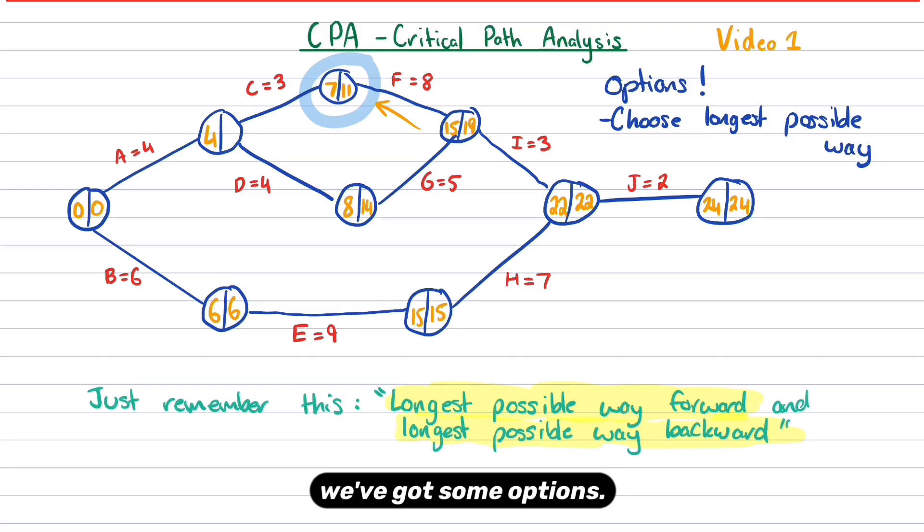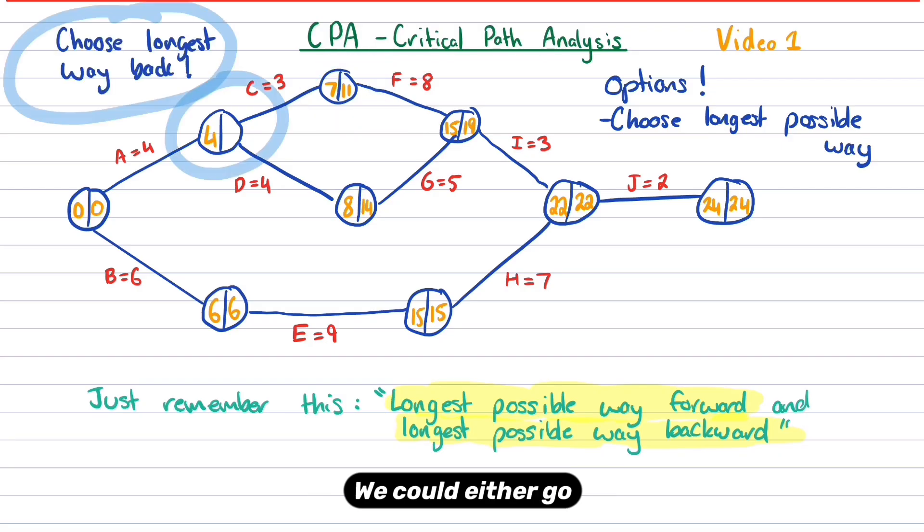Now here we've got some options. We could either go five and four, or we could go eight and three. But remember we want to choose the longest way backwards. The longest way backwards would be going eight and three. So 11 take away three, 11 take away three is eight. So a little bit of a typo that should be an eight in that cell, not a nine.